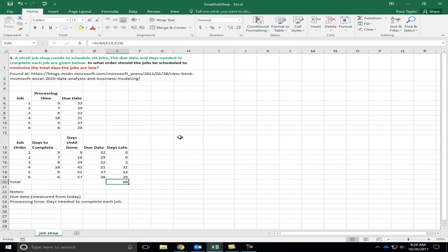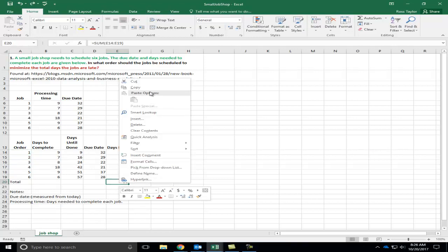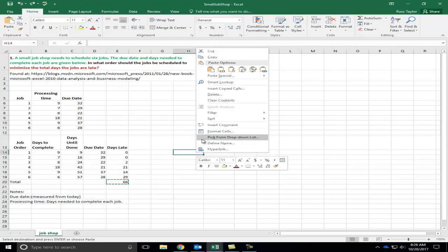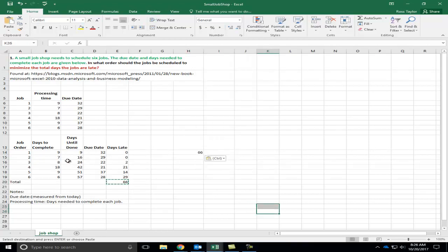Okay. So, once again, at this point for the job order, I can go through and, let's say instead of running them 1 through 6, and before I do that, let's just look at how many days late we are right now. So if we run it 1 through 6, we're going to be 66 days late. Well, what if we ran job 6 first, then 5, 4, 3, 2, 1.